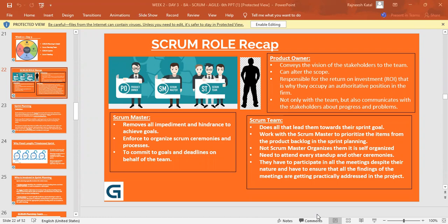But if it is very big and has a lot of impact on time, it will extend your timeline by one sprint. It may require additional skill sets which you might have to get. In some cases, the product owner also has to check with the stakeholders or senior management and then get back. So that was with respect to your point.